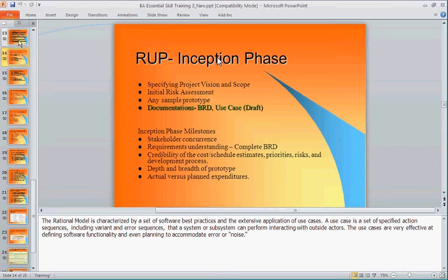All right? If you've built any prototype, remember prototyping is part of requirements gathering, right? So if you build a prototype, they must agree that yes, this prototype is correct, accurate. And lastly, as part of your project plan, you must have put together, we will need 3 weeks for our inception phase, and we will spend $200,000 on it. Well, have you exceeded it?